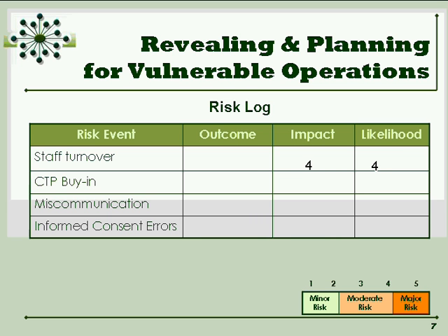The likelihood of this event happening again, or something similar happening in regards to misconceptions, is significant, and I would rate that a 4 out of 5. And the likelihood of impact of the event can be quite significant as well. So I rated both as 4s, which would be a major risk and something that would require a contingency plan.